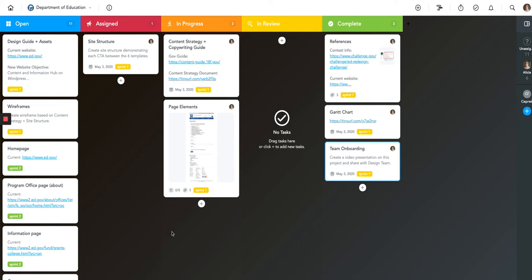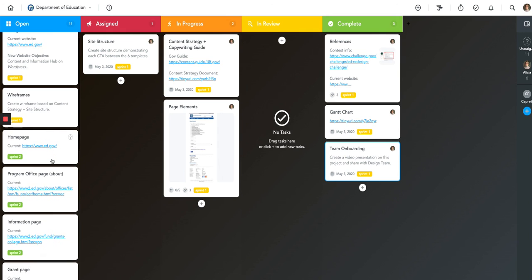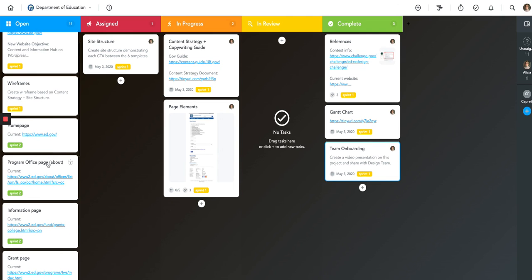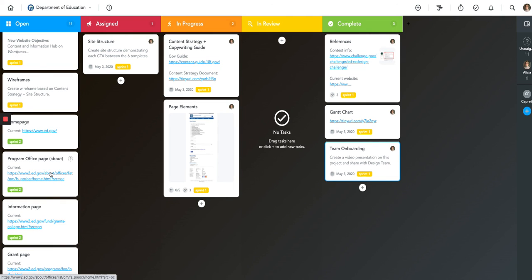So as I go through the contest landing page, the workflow becomes very clear. I enter all of the details from the page into the appropriate task, and this includes the overall site structure, the user journeys, various page elements that would complement the website's objectives, the strategy for content, etc. Finally, as I finish creating all of the tasks needed to complete the design project, I organize them chronologically and into categories. These groups of tasks are called sprints, and they're needed in order to keep the team members clear on individual deadlines and from burning out from oscillating between too many projects.